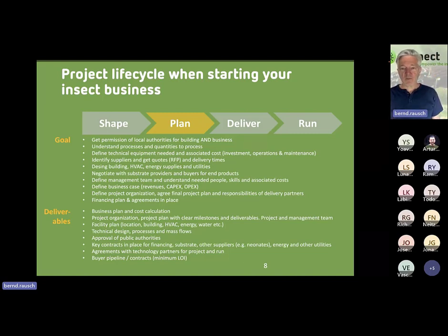And this is one important thing as well, a hint. Very often we see business cases where the whole sales effort is not planned in, and that can easily go up to 20 to 25% of your overall costs, in terms of market development, sales development, and things like that.